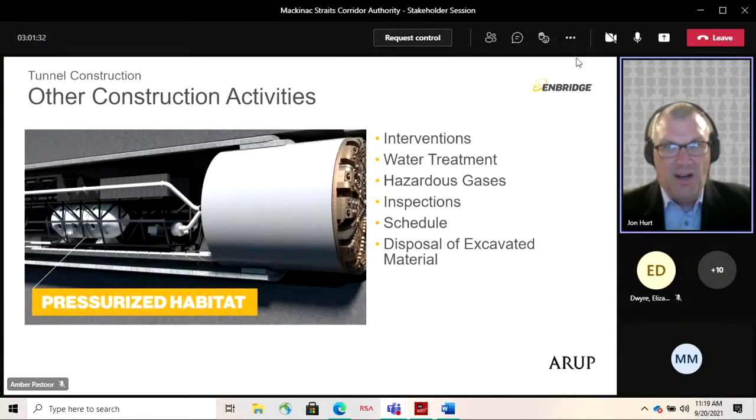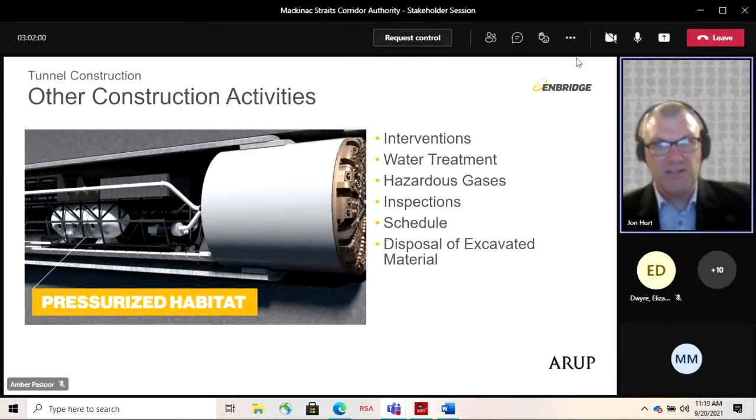Yeah, it's somewhere typically between 12 to 18 months from the point of ordering the TBM to it being on site. There are just a few manufacturers around the world. And what has happened on the project, though, is some pre-design has been done before the order's been placed, so that some of that preparation has already happened. That will save a couple of months on the schedule.